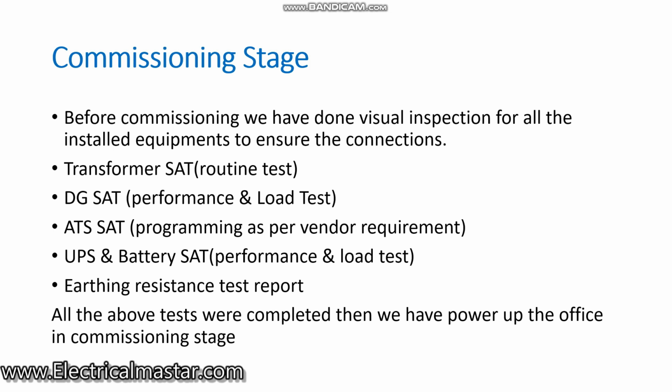Once all the things are okay and accepted by the concerned teams, then we can power up the office through the transformer. The transformer incoming breaker will be energized. It goes to the ATS. From the ATS the load is transferred to the main DB. From the main DB the load is distributed to the sub DBs. In this way I completed my project last year.